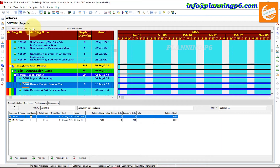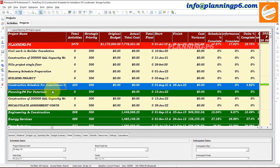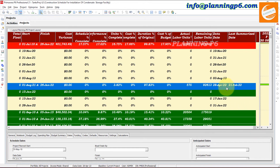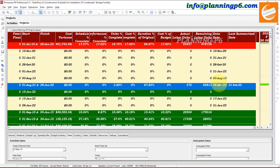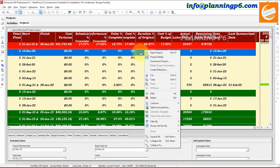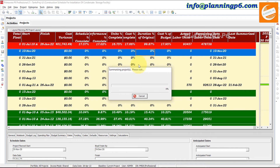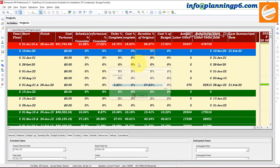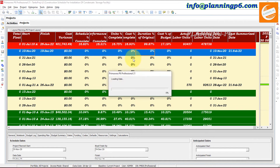Now if we move to the Projects tab, you can see all the values are showing here — whichever columns we assigned. There is no budget assigned so that field is empty, but Start, Finish, and other fields like Remaining Labor Units, Actual Labor Units, Remaining Duration, Units Percent Complete are all showing. Data Date is shown as 28th of April and the Last Summarization Date is also visible.